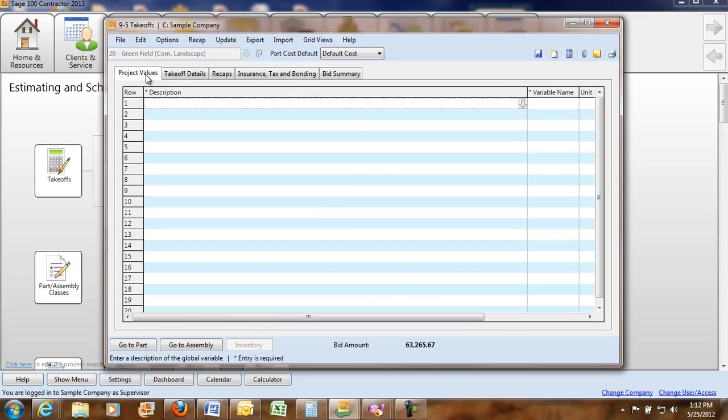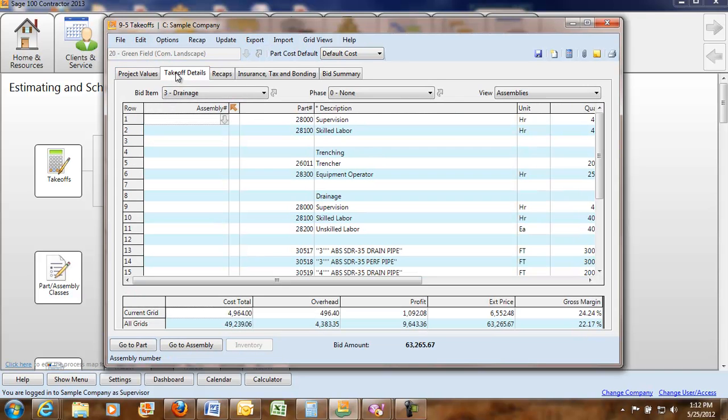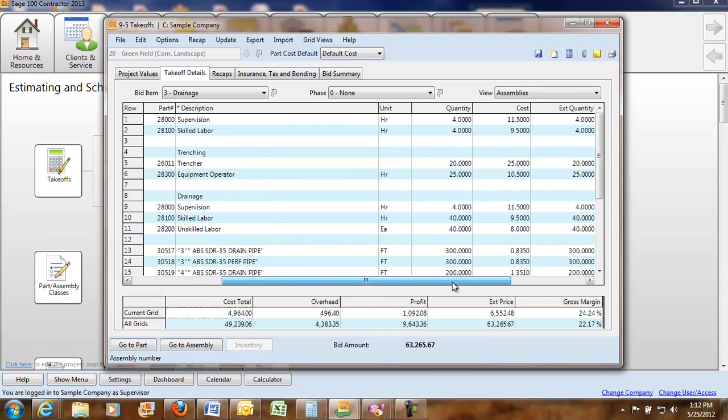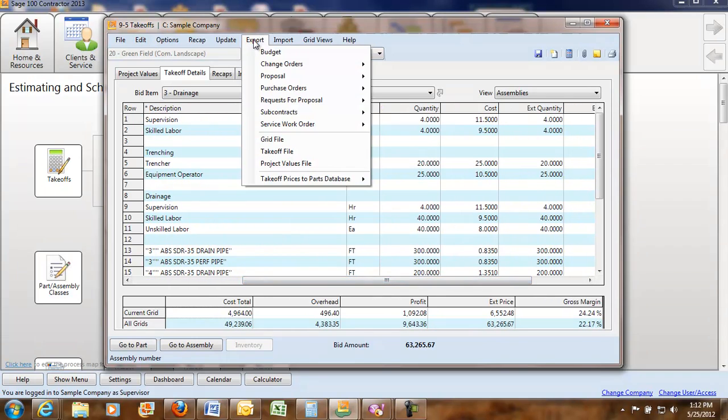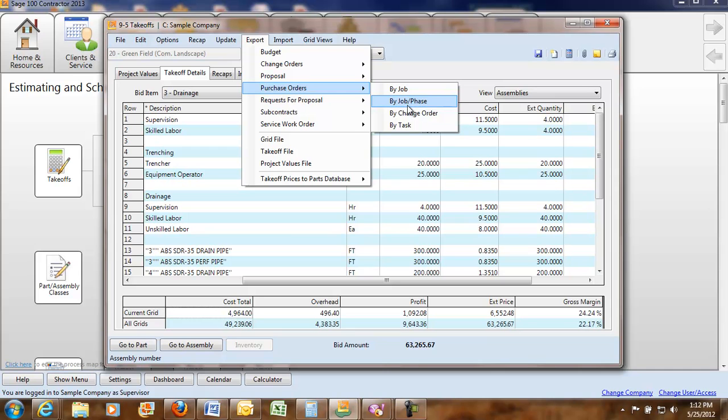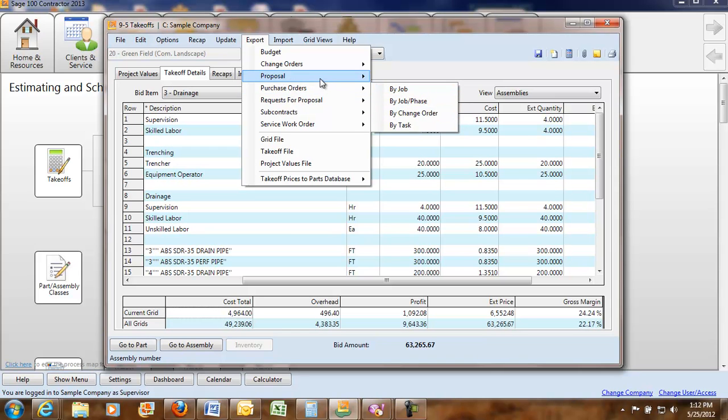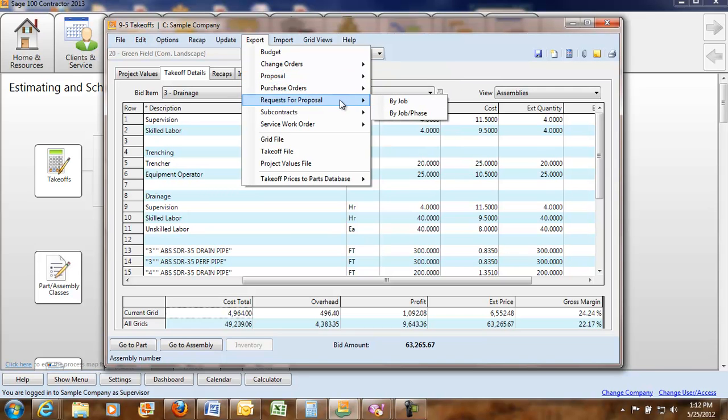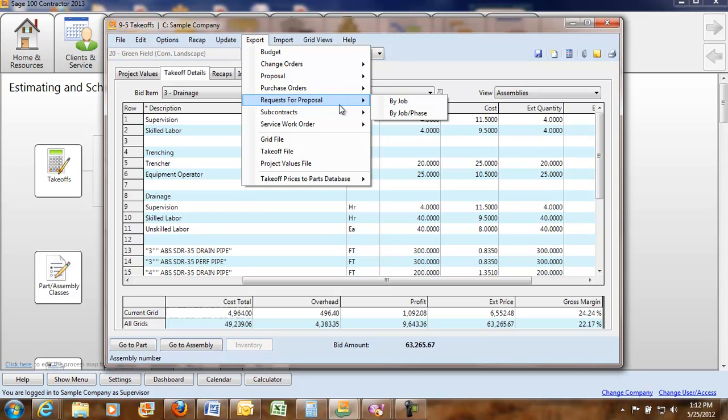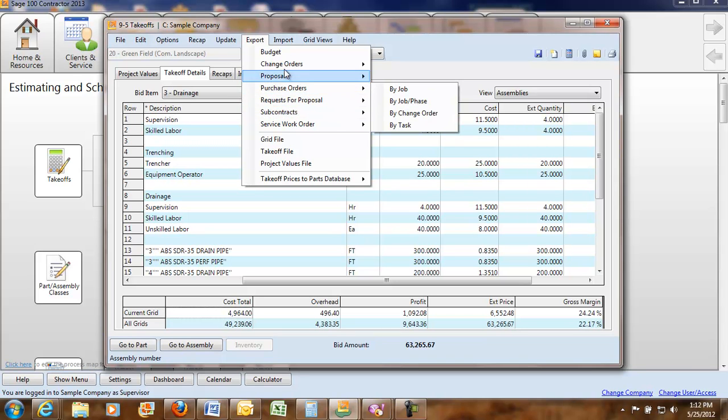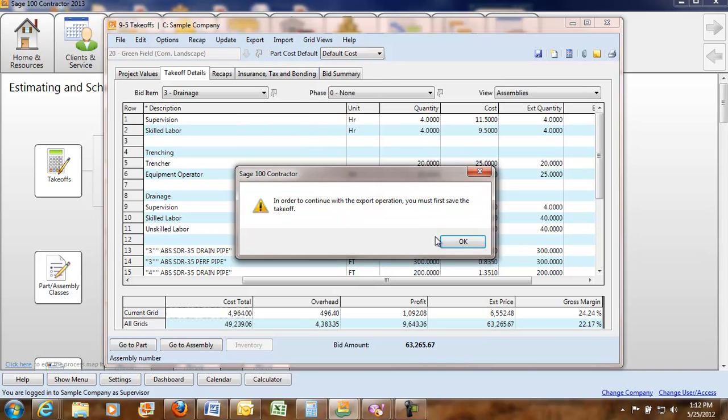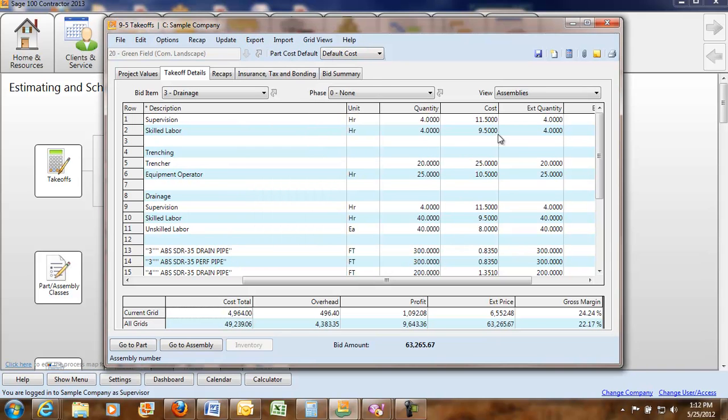From here, look at your takeoff details. We got everything in here. You can export out to purchase orders. You can do it by the job or by the phase by a change order. You can export it out to proposals. You can send out requests for information or a request for proposal for subcontractors and out to the budget for the job.